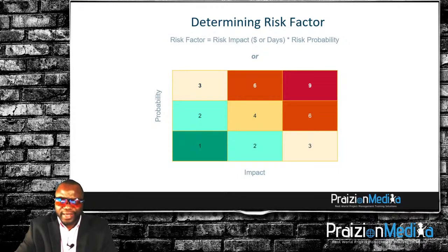And if there's a high level of impact in terms of if a risk associated with that backlog item happens, the impact would be high or the probability would be high, then we could score it, for example, as a 9. Now, this is a simplified version of the typical probability impact matrix. In the world of Agile, we don't go as far in many instances, so this is scaled down. Some matrices go all the way up to 25. This is all the way up to a 9, which is still okay. We can still do what we need to do.